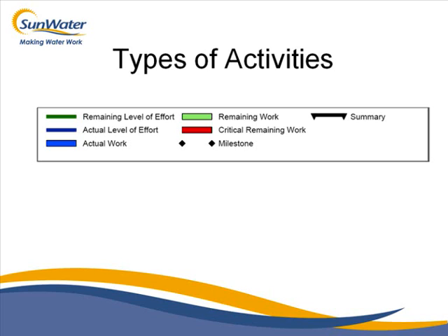So it helps spread out your costs and your duration of hours and so forth like that. So if you've got 40 hours of work to be done on a project, and you've got 4 weeks or so to do it, that spread out is actually about 10 hours per week on that activity. Whereas in real life you might do 20 hours in 1 week, not do anything for 2 weeks, and then do another 20 hours in the last. But this level of effort actually just helps you spread it all out. And then obviously the other one's self-explanatory.